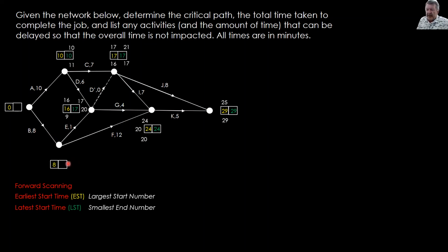We better come down here, I think. Let's see, 17 take away 1 is, oh, that's going to be up the top, isn't it? So 17 take away 1. No, let's do this one first. It's from further back. 24 take away 12 is 12. 17 take away 1 is 16. Smaller number goes in here, so it is 12.